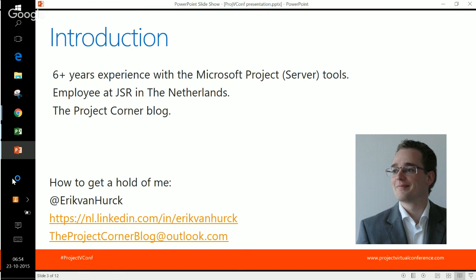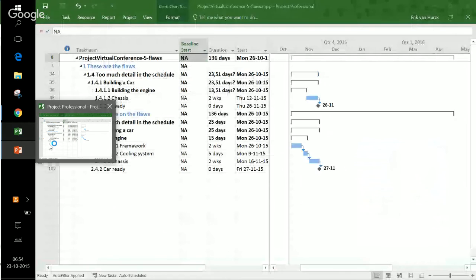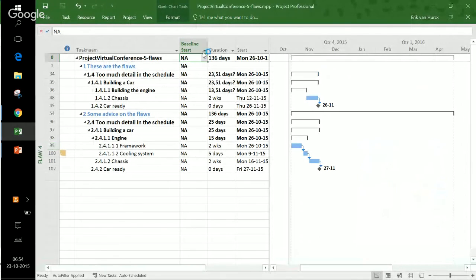which is NV. I'm not going to speak German here, but NV is for German clients, and you might want to look into what it is for your organization or your version of Microsoft Project. You can easily do this by just selecting the baseline start, and if there is a value that doesn't look like a date, then that is the value that you want to incorporate